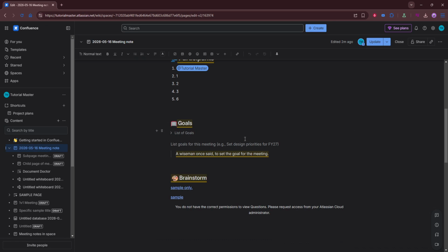It's also important to confirm that everyone who will view the Confluence page has at least read access to the projects and the plan in Jira, because the link will respect Jira permissions.